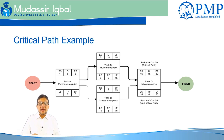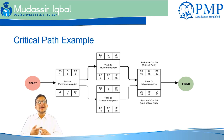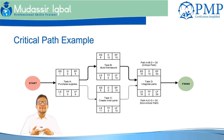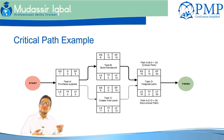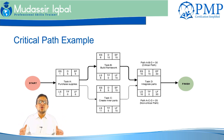You can also use the critical path to determine the earliest date the project may be completed. There can be more than one critical path in a project, and it is possible for the critical path to change as the project proceeds. Importantly, the critical path does not identify all critical activities — it only defines the duration and completion date. There may be very key activities happening in parallel on which the success of the project actually depends.